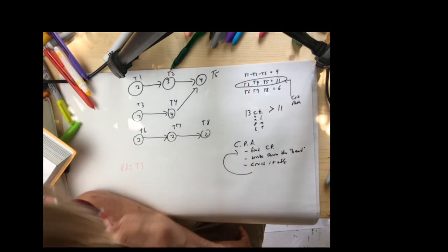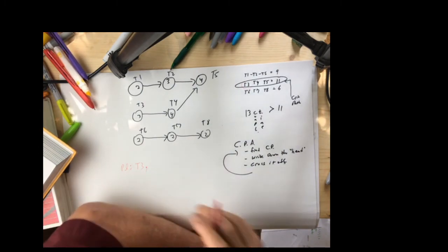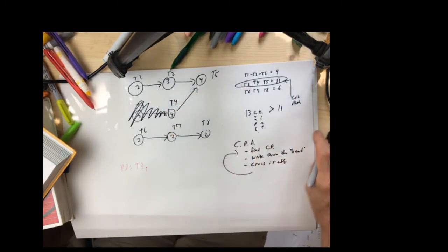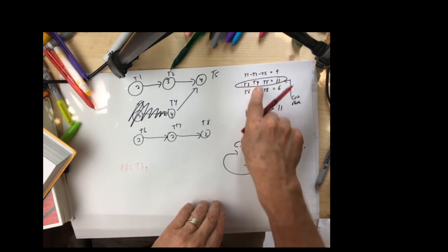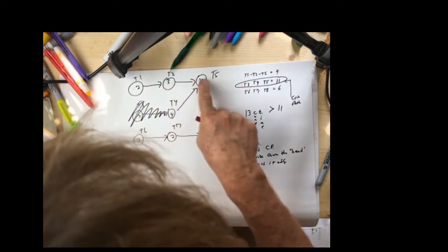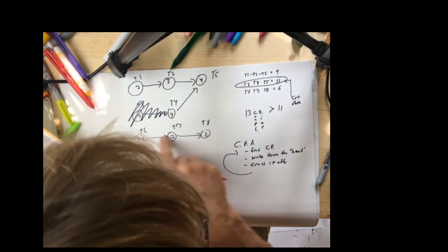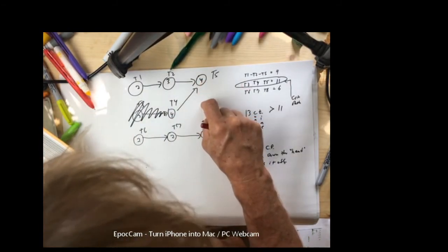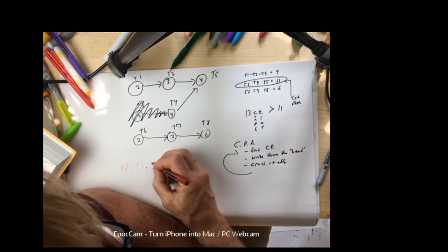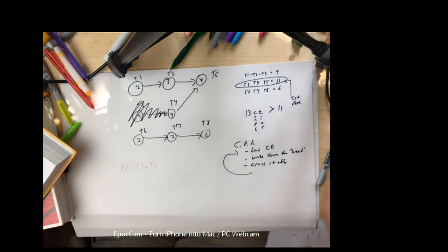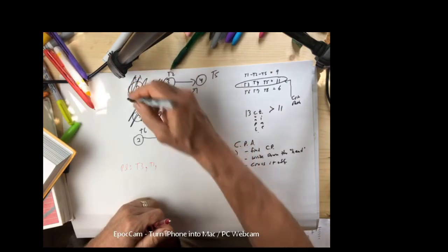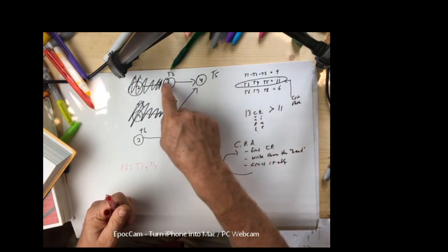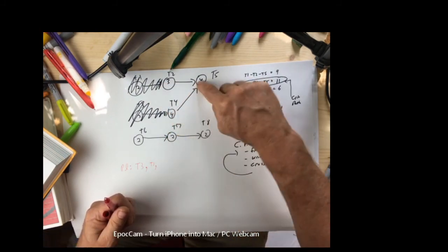This is the beginning of my priority list. Now, write down the head, then cross it off. Now repeat. So now, this is no longer the list of the critical paths. They are 9, 8, and 6. 9 is the longest in this graph. T1 is the head, so I'm going to write it down. I'm going to cross this off. And now I'm going to repeat. 6, 8, 7. This is the longest path here.